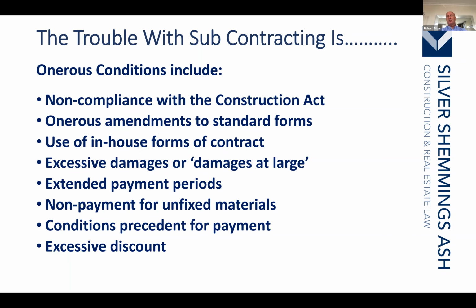Where it says you've got to complete by a completion date, but doesn't say what happens if you don't, then you have what is called general damages. What this means is that another party can recover the cost that they have incurred as a result of your breach. For example, prolongation costs, and provided they've given you full information when the contract was placed, the liquidated damages under the main contract. So check that one.